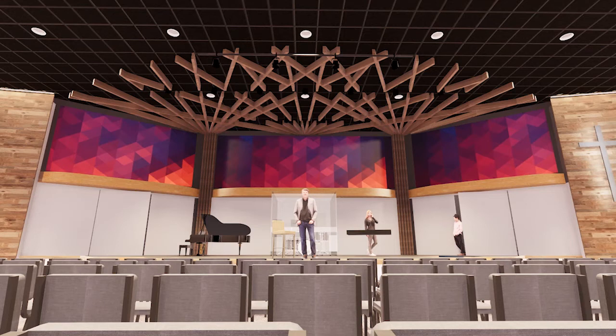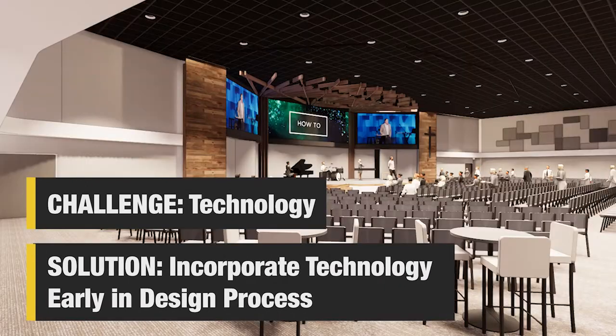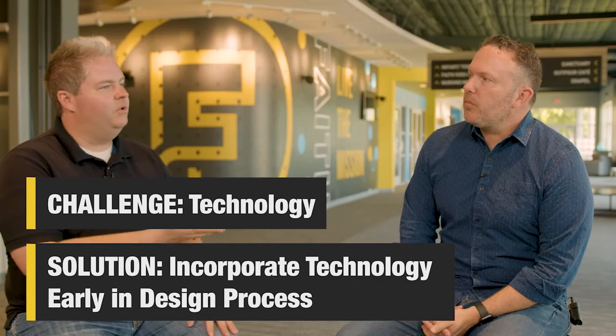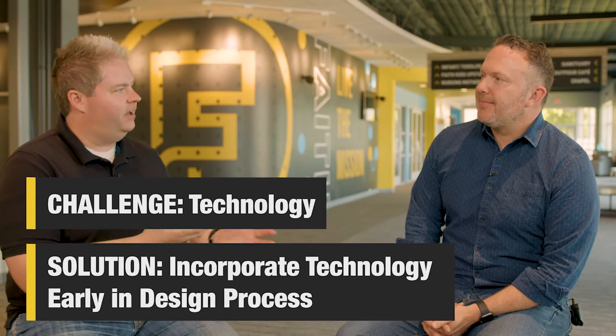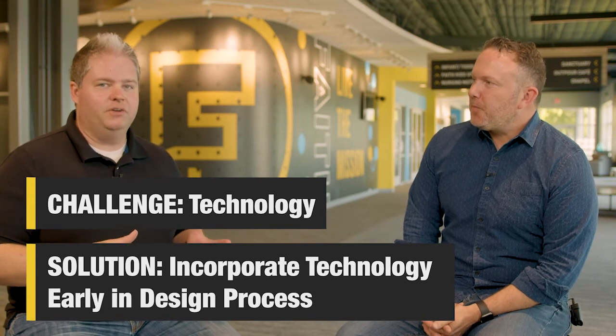So one of the huge technology leaps we made was the screens, the visual component, that's just kind of modern worship now. We had to step that up. And so we actually asked that you guys incorporate that into the design. We went from a small, tiny middle screen in the back of this long sanctuary to now three major screens set up in the sanctuary space that changed our ability to communicate in a more compelling way visually. That was a huge gift. Well, and to that point, integrating that technology and the resources from an audio-video integrator early in the design process is critical for any project, but especially for a renovation project.